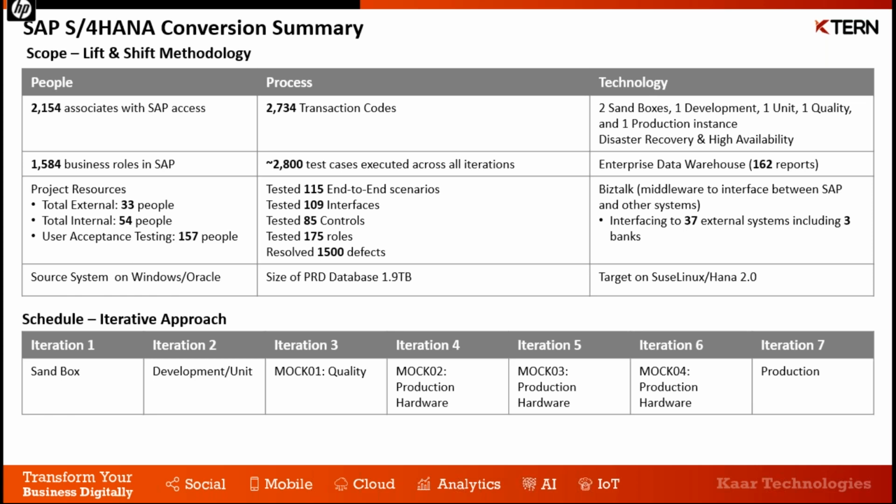So validation took weeks for a sample of data sets. Imagine if you want to do that for 100% of data, that too with a customer DB size of 1.9 TB, it could have taken months. So I see a risk here of prolonged downtime and uncertainty of the overall process, with human errors and insufficient business knowledge.